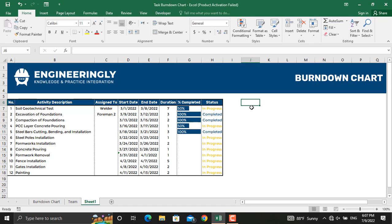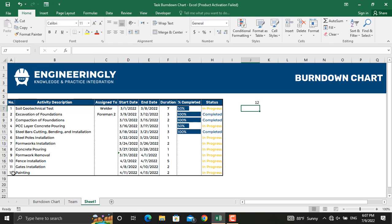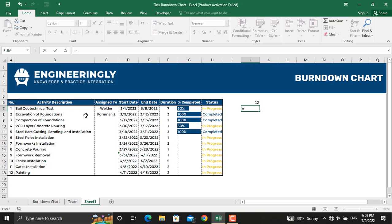Our total number of activities will equal the count of values in these cells — it will be 12. As we go further in the project, the number of remaining activities will be deducted. For the planned column, write equals this cell minus one, and drag it down to the last activity.